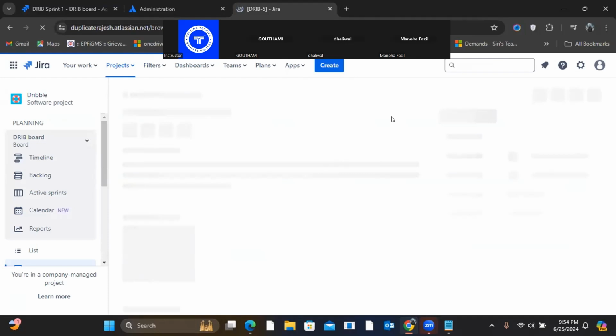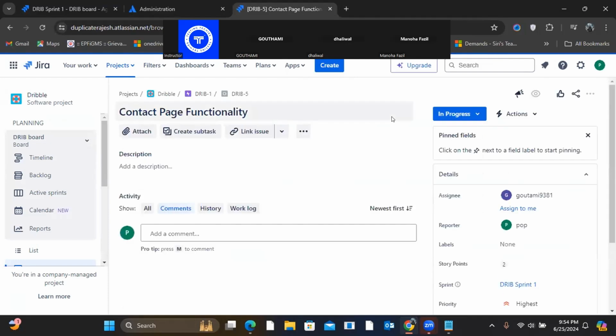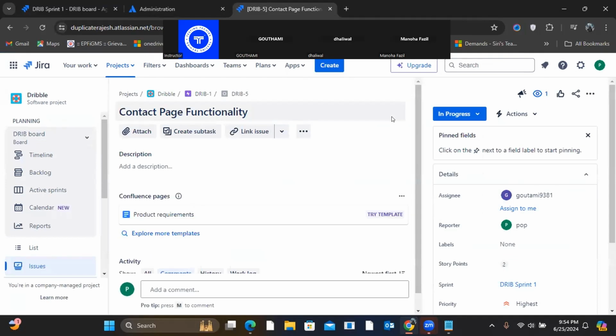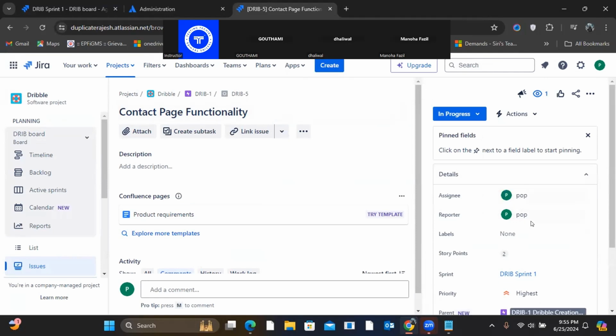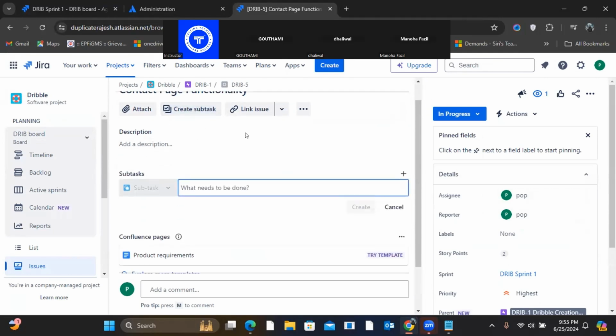See, now this is the user story. A user story is something high level, right? We have to subdivide the task, and then subdivide it again. The complete user story may not be assigned to individual team members. It may be assigned to the Scrum Master. Let's say it is assigned to me. So here I can create subtasks. First, I created development of this particular feature.